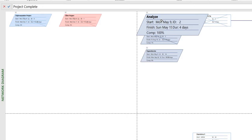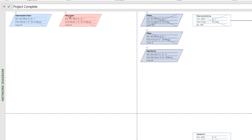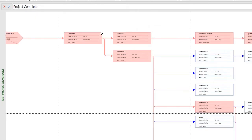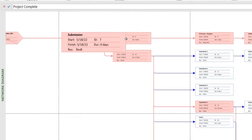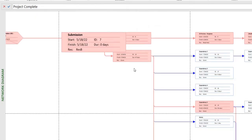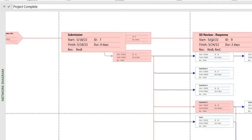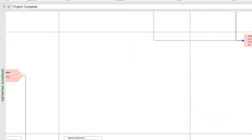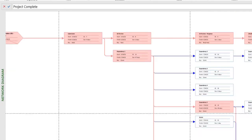These are summary tasks, so they are differently colored. And you can see these pink boxes—these are basically critical tasks. So these represent tasks or summary tasks that will affect your project end date. The rest of these transparent tasks are non-affecting to your project end date, so they can be delayed until a certain level until they become a critical task.